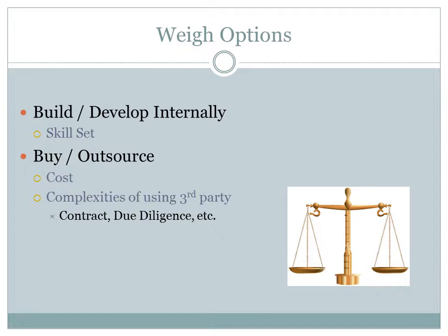If pursuing an internal solution, ensure that resources are available and have the necessary skill set. If considering a third-party solution, be sure you understand all the internal compliance and/or regulatory implications involved, as they may add a considerable amount of time to the project lifecycle.